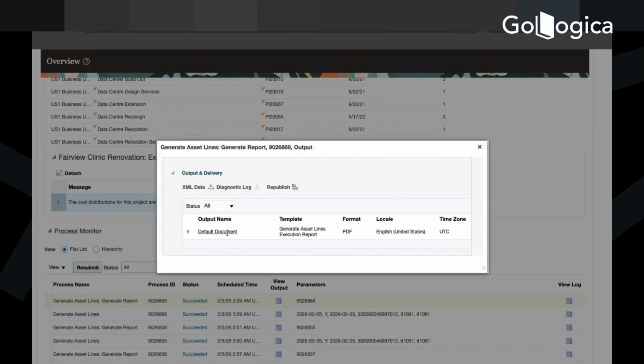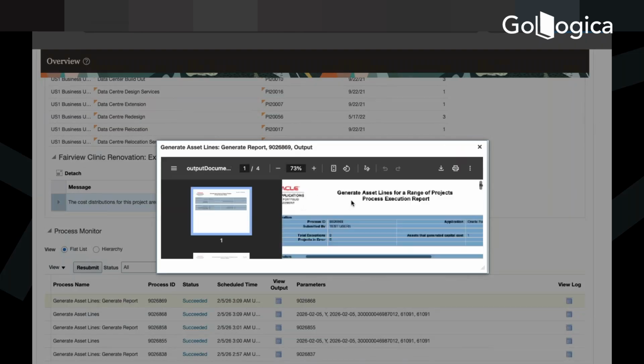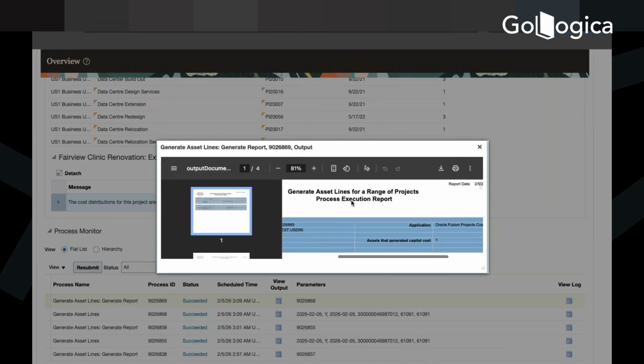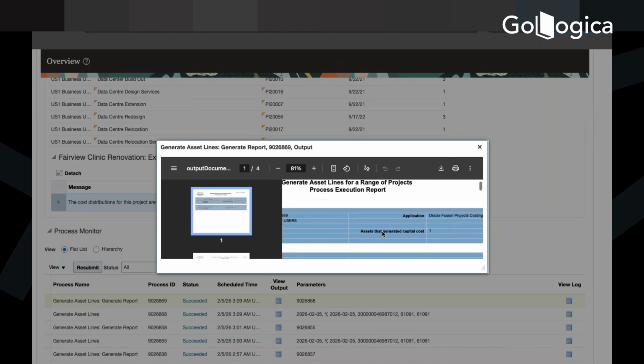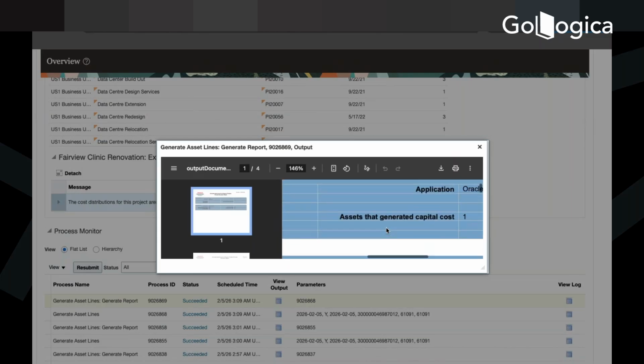But you're running the mass addition as soon as you send it, right? On day one itself. It's not like when the project gets created, costs are getting accumulated, and you're sending it to the FA as you're accumulating the cost, right? No, we are not sending on a day-to-day basis. After all the cost has accumulated, after we know there is no further cost, then we transfer to the asset. That will be done as part of your actual in service date, on that last day.